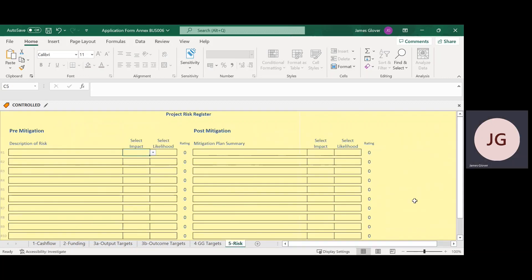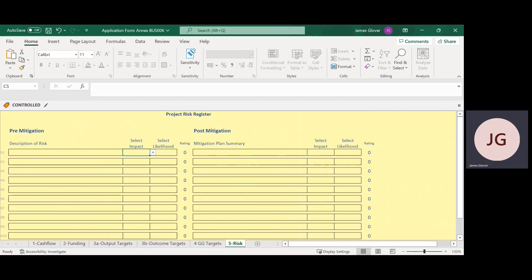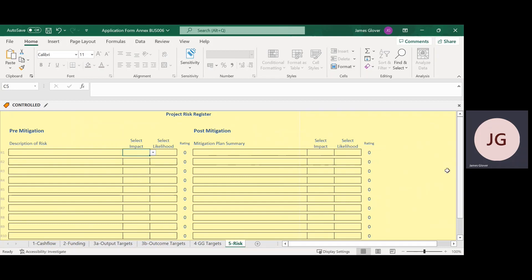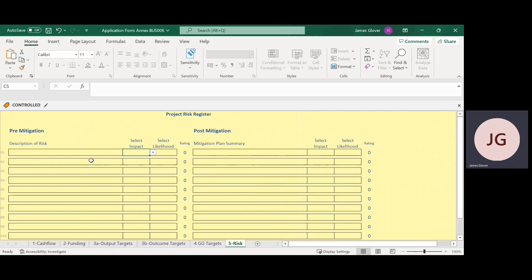Tab 5, Risk. We are keen to understand the key risks to delivery of your project and how you manage and mitigate them. For example, what happens if the project applicant falls ill? Who will deliver the project to time and budget? Your mitigation may be to hire a project manager or train other colleagues in the organisation to lead the project. Other risk examples could include the lead supplier going bankrupt — what mitigation would you put in place? Each project's risks will be different due to the scale and scope of the proposal. We are looking for you to demonstrate that you have considered the main risks and how you have managed them. We look forward to receiving your completed application, Annex and supporting documentation by the deadline. Thank you.